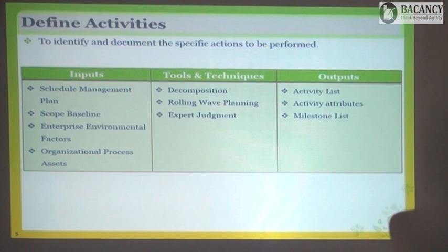Instead of one activity, you can have 20 activities there. When you come to the tracking part, monitor and control, you will have to provide data for each and every level. So imagine how much time you will have to spend in updating those tasks. So exercising control will require additional effort and additional time, and on top of everything, it is not going to give you any additional benefits. So you, as a performing team, will define at what level you want to exercise project control.